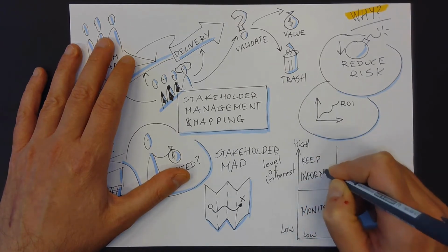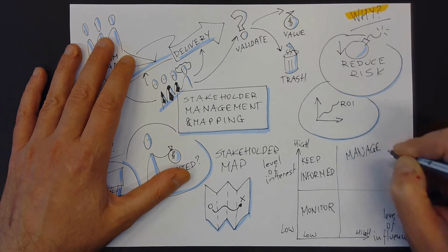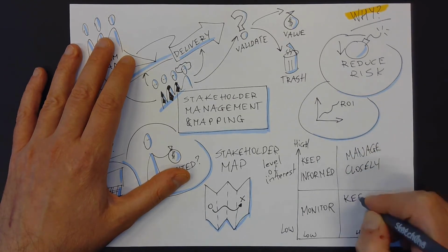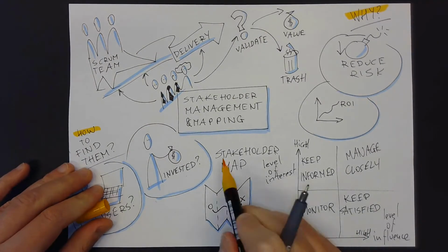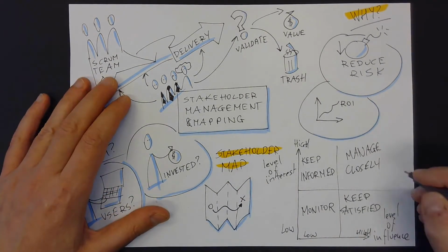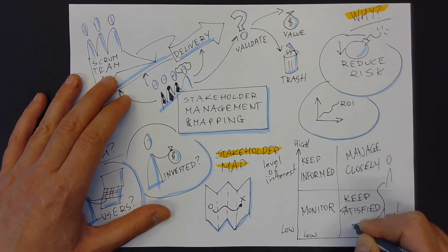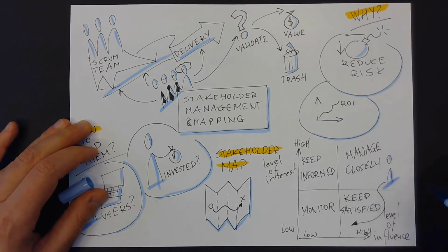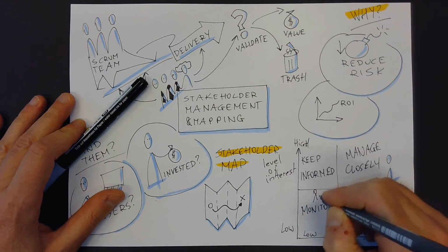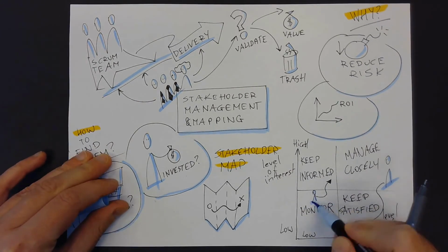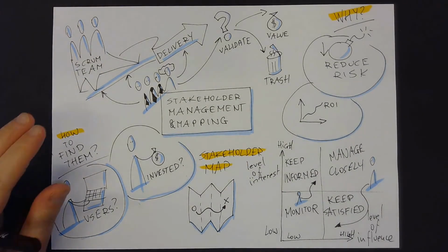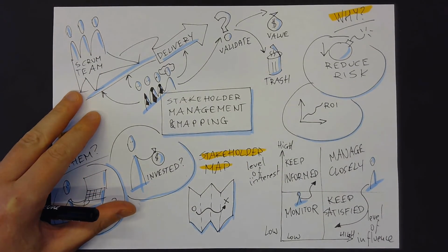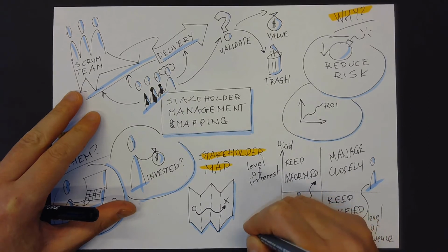Likewise, in the upper left corner you have the keep informed section with stakeholders that you need to provide with regular updates. The stakeholders you want to manage closely are the ones that can both make or break the product, and that's the stakeholders that are in the Keep Satisfied section and the ones in the Manage Closely section. Be specific when you're defining the stakeholders, and also remember to update the map throughout the project or work as they may change depending on phases of your work.